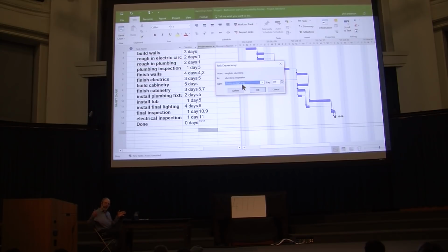So you can set up that relationship with all of the tasks that are involved in the basement while the pump has to be there. You can say that the pump has to start before all those and has to end after all of those are finished. Anyway, you can put in all that sort of thing. The thing I was getting to was this lag.